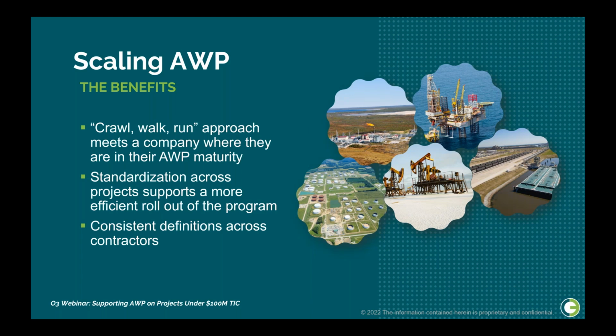So I normally would advise you to put your project through phases. Phase 1 can be work phase planning and key disciplines only. In phase 2, you try to implement basic proof of concept, that is basic POC and sequencing, and work phase planning for all disciplines. And phase 3, go for the kill. Full AWP, complete implementation of best practice.